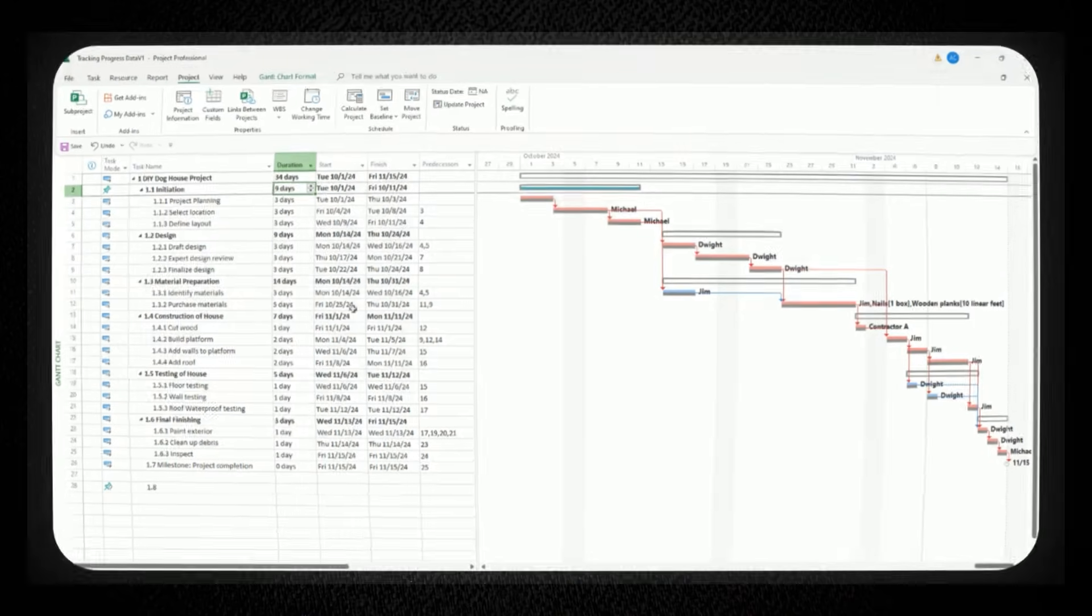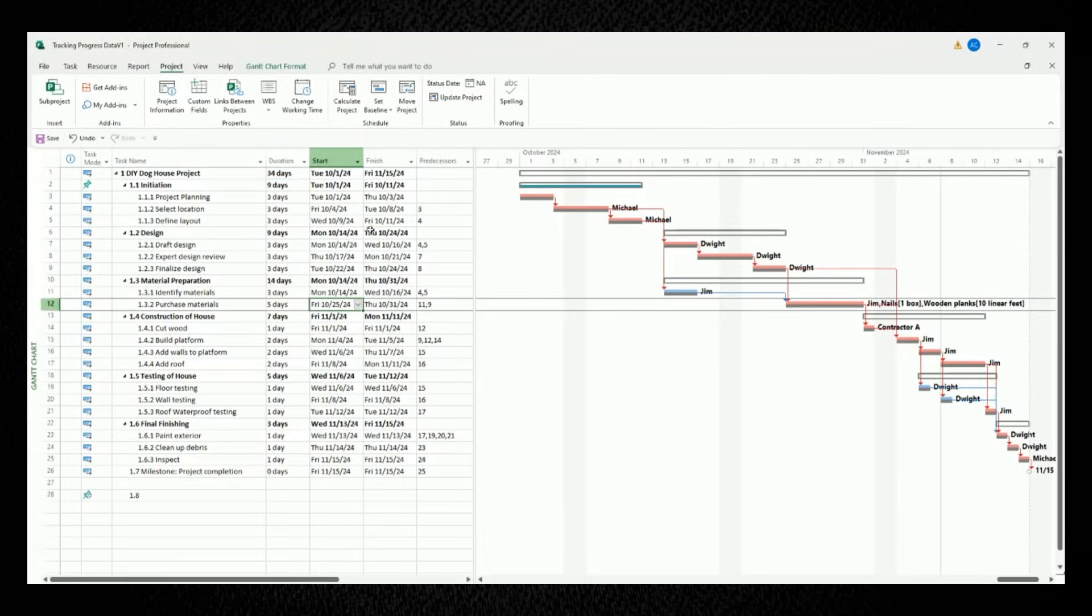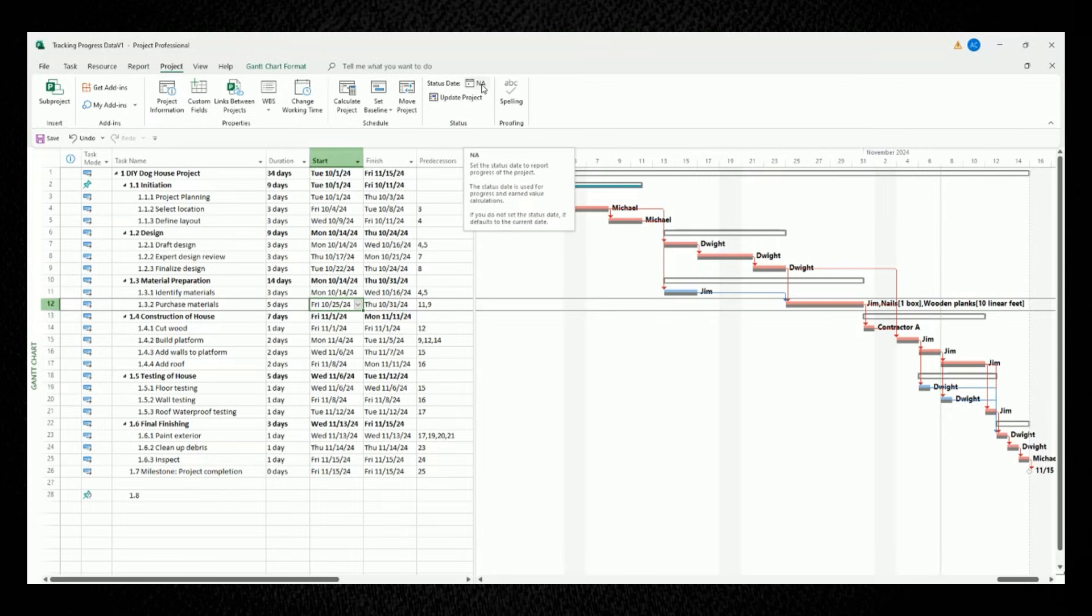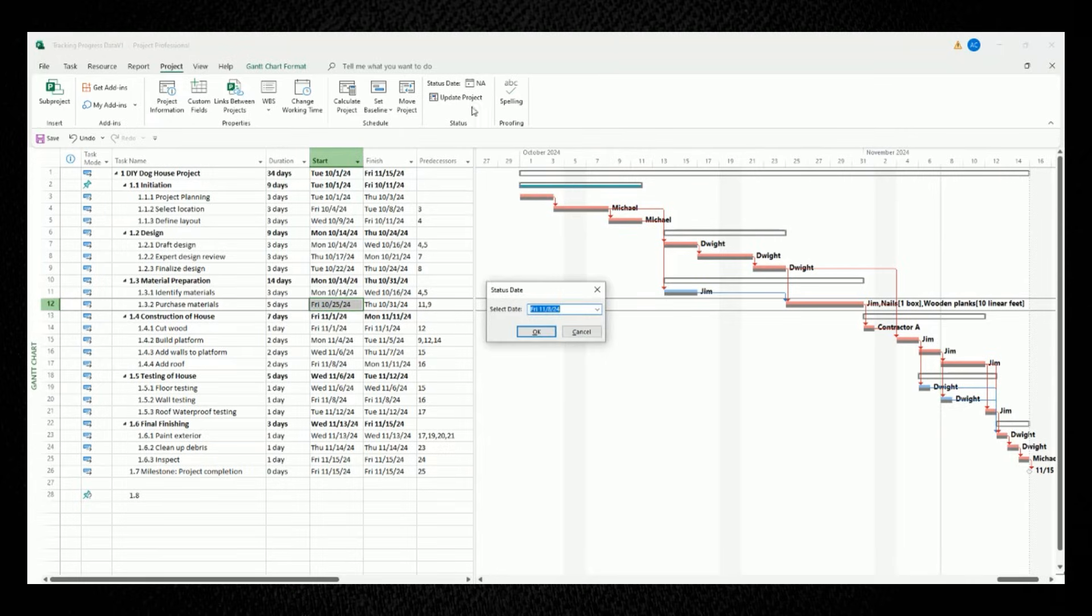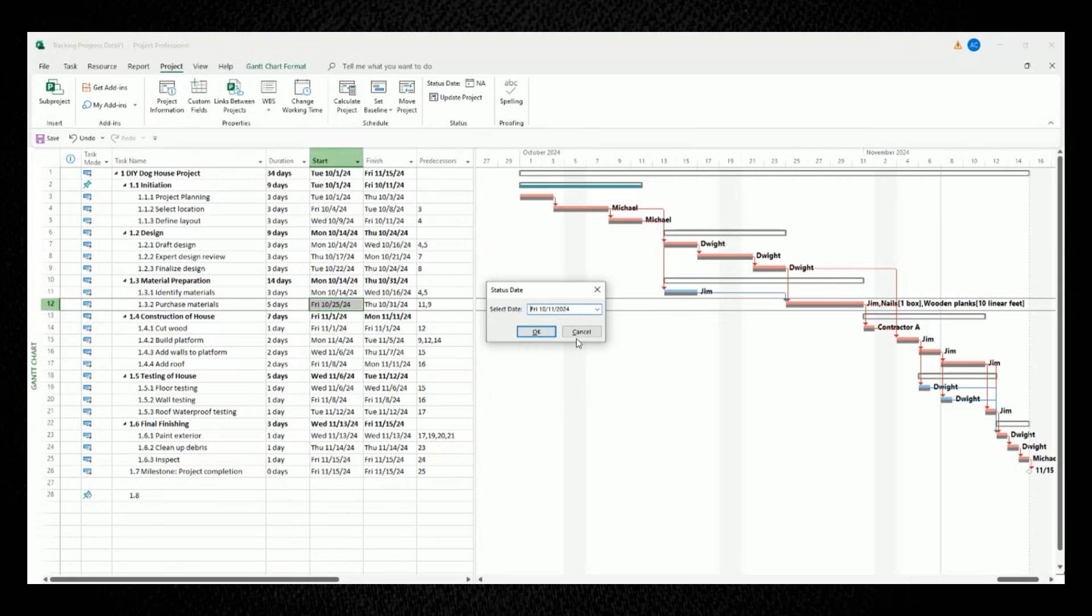So to create your status date, select the project tab at the top portion of your screen and move your mouse to the status panel. At the very top here is the field for status date, which currently shows NA, since it hasn't been set yet. For our example, let's click on this and let's mark our status date to be Friday, October 11, which coincides with the planned finish date of the third task in our plan, which is define layout.